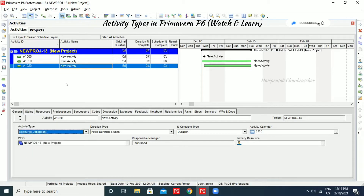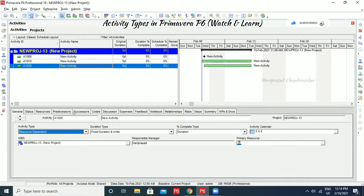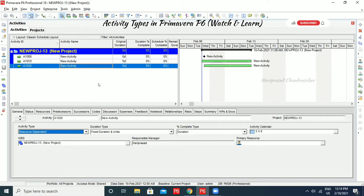Now we will see what Resource Dependent means. Resource Dependent means a particular resource has a particular resource calendar. If you set this as Resource Dependent, the activity will consider the availability of resources based on its own resource calendar, not based on the activity calendar. So if you have a calendar of 5x8 here and a resource calendar of 5x10, it will consider the 5x10. That is what Resource Dependent means — the activity considers the resources assigned to it and their availability based on the resource calendar.